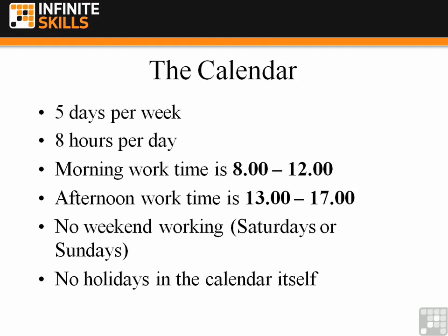So we need to set our own working pattern when you set up a project, and obviously we'll go through how you do that. You'll probably need to create some custom calendars as well for workers that have different patterns, so shift workers or part-time workers. By no holidays existing in the calendar, I mean no public holidays, not just individual vacations. And you'll find without placing the public holidays in your calendar, you can make a difference of 2 weeks in every year.